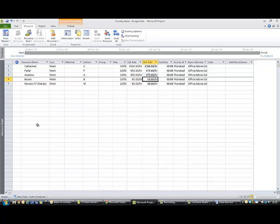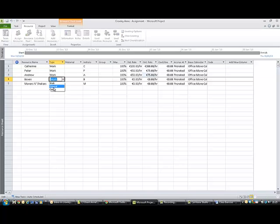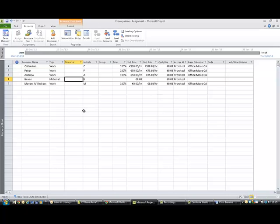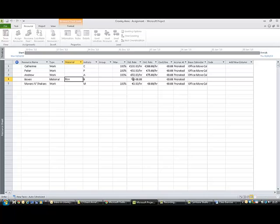Your boxes then are not a work resource, they're actually a material that you'll use on the project. So you change the type to Material, and you'll note that some of the columns over to the right change as well. So what is the material represented? Well, they're boxes, so you put in Box. And over here then you're saying what is the rate per box, what does it cost you per box? So the boxes are one euro each, so you put in one euro there.